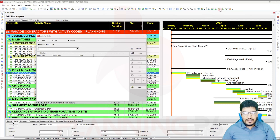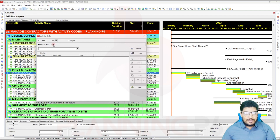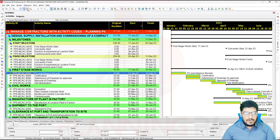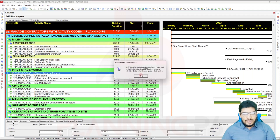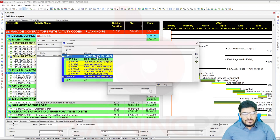I will prepare a new one. I have deleted the previous activity codes for any project, so I will add. There are three options you can find here: Global — which means you can use it within the database, or if you are using the EPPM software you can use it for all projects. Activity codes for EPS means you will use the activity codes within the EPS. If you select the EPS, then you are able to use it within that EPS, not other Enterprise Project Structures. If I go for the EPS and add one, Primavera will ask me to give the Enterprise Project Structure.